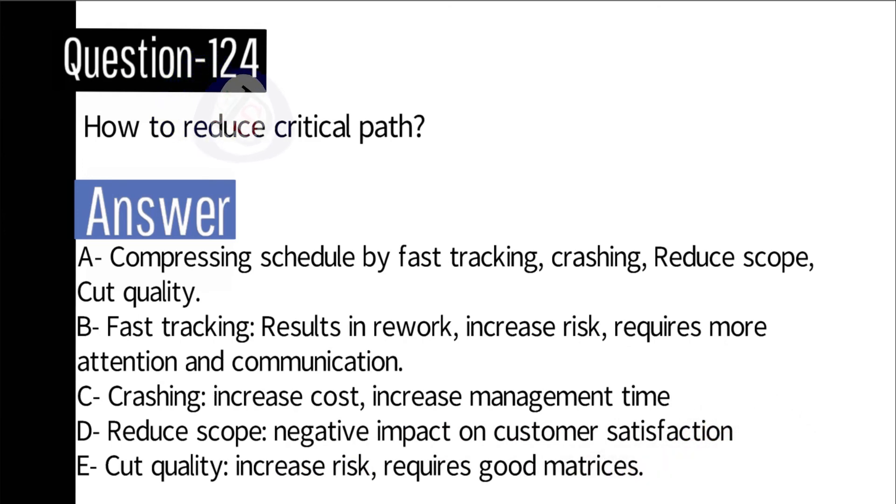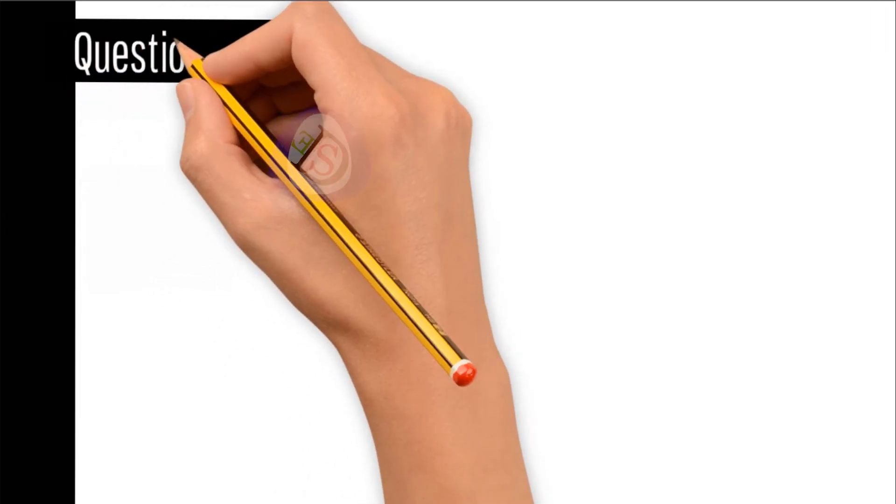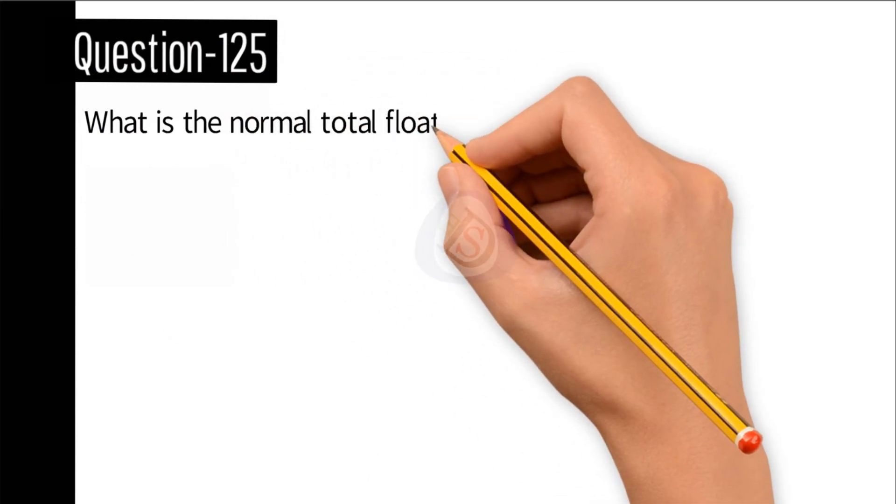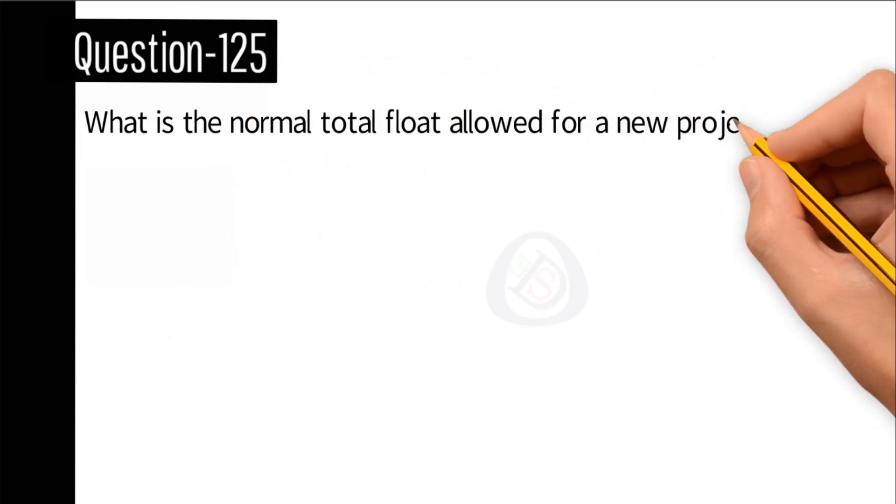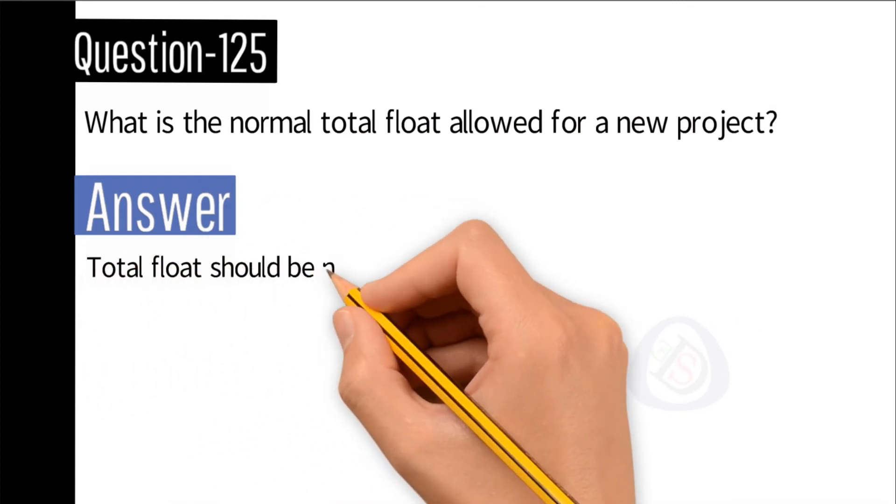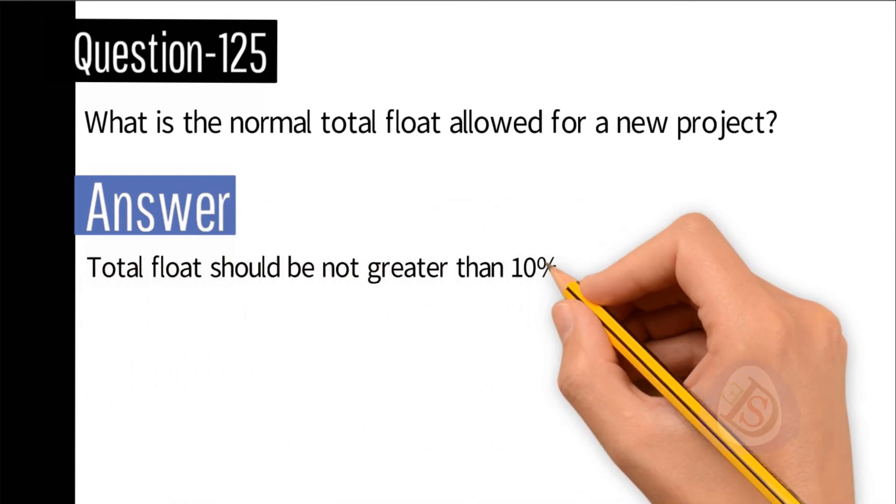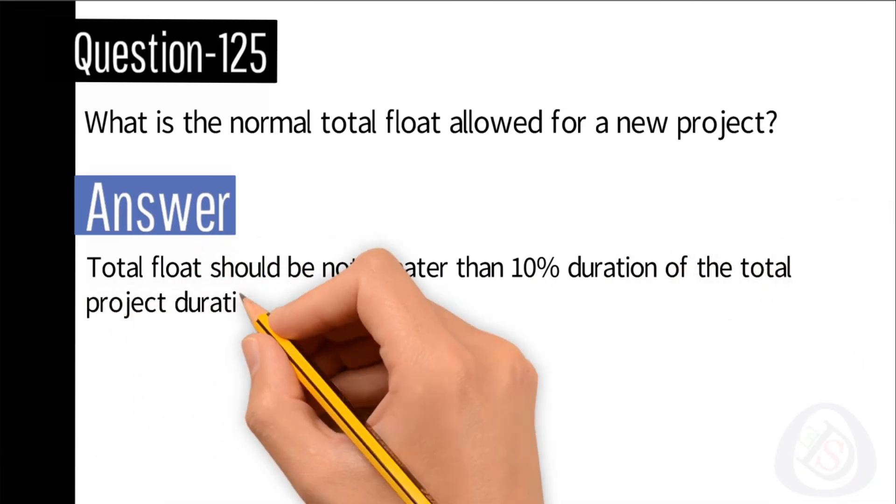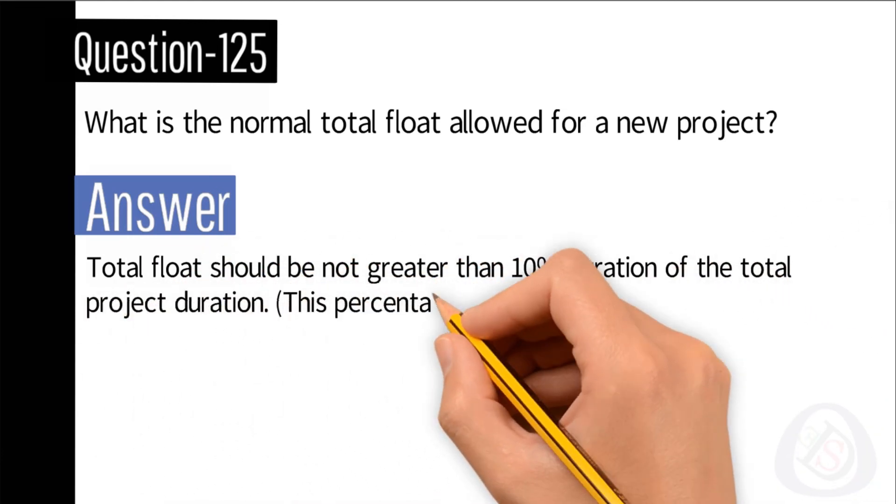Question number 125: What is the normal total float allowed for a new project? Answer: Total float should be not greater than 10% duration of the total project duration. This percentage is subjective.